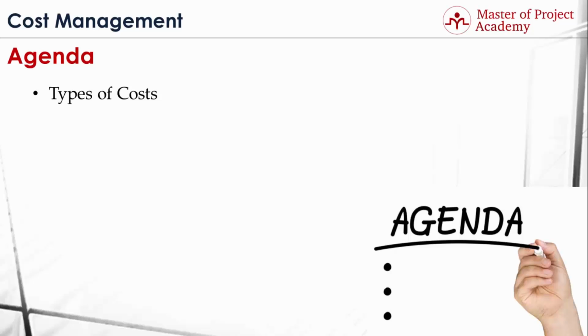There are different types of costs in a project. For instance, office rent for a project is a fixed cost. Regardless of how many project resources will work, you need an office, and this cost will be in your project budget. On the other hand, material costs, expenses for project personnel, etc., will be variable depending on the amount of people or materials. We will see these different types of costs in detail.